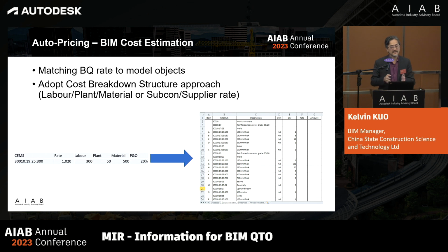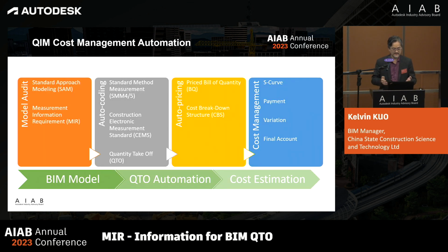Okay, because all the pricing has a data library, okay? What kinds of material, how many workers, the productivity, and also what we say, plant, labor, materials, okay? How many plants we need to use, and then how much profit we need to put in. All is data. All this data can be automatically generated. So after you have the auto billing, you can have auto pricing. Then auto pricing is auto cost generation. Okay, so actually I suppose we should go in that way. And this is my natural, my ultimate goal, okay?